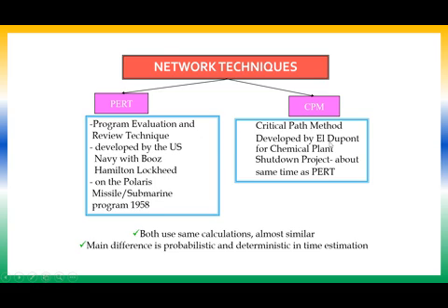CPM was actually developed by E.I. DuPont for a chemical plant shutdown project about the same time as PERT. Then PERT was developed by the US Navy with Booz Allen Hamilton and Lockheed on the Polaris missile, that is the submarine program, in 1958.